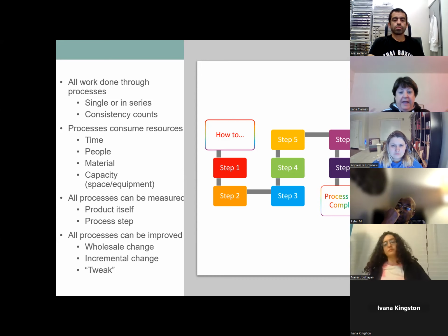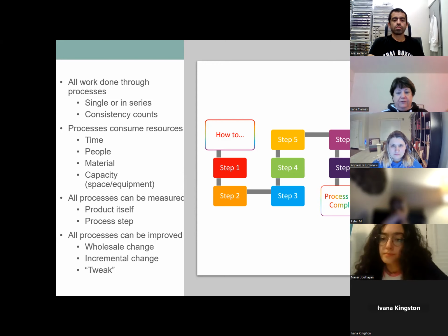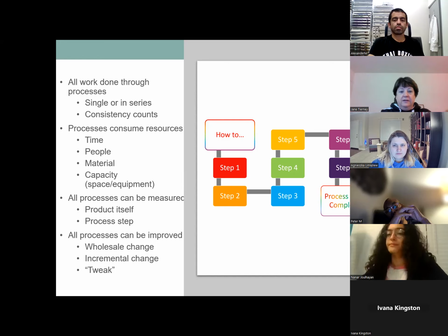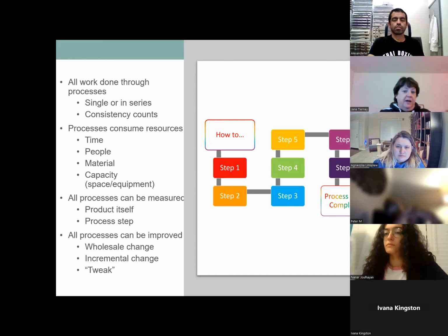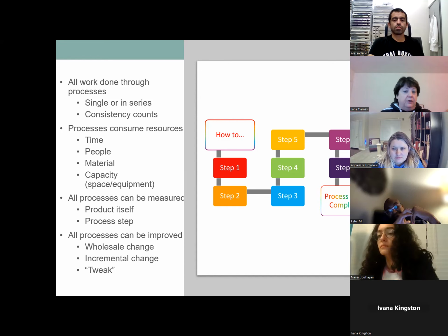Now, if you're baking a cake, if you have 2 people or 2 different workstations, somebody can be making a cake and somebody can be making icing. Now, you don't need the icing until the cake is cooked and cooled, but you could still be making it at the same time and put it in the refrigerator or set it aside until the other is done. So you could do those in parallel.